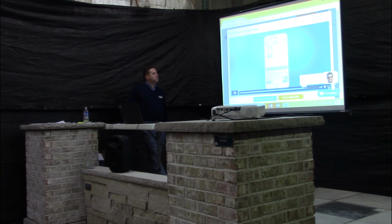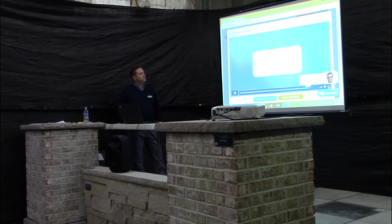I've shown you some amazing features and ways Buildertrend can save you time and money, but if you want an immediate return on your investment in Buildertrend, then look no further than change orders. With our change order feature, you can now quickly create a change order on the go by adding a title, price, notes, attached docs or photos, and then email the change order to your client. Or just hand your mobile device over to them to sign right there for an approval on an immediate change order. It's so simple in Buildertrend, and this ensures you always accurately document change orders and never lose another dollar.